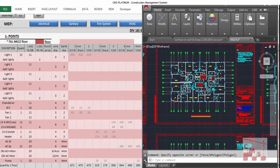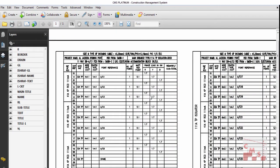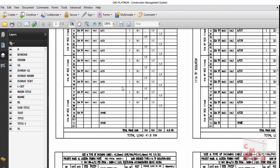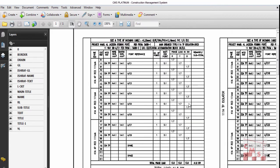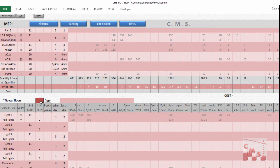There are also power drawings related to pumps and other electrical items. You'll have a load schedule showing all the components of the DBs (distribution boards), including MCBs, ACBs, wires, cables, and all components — everything found inside the load schedule drawings. In CMS, under MAP and electrical, it asks for the first category. As before, we divide buildings into floors up to mezzanine or podium level, and separately for typical floors — the same approach used for structure work.